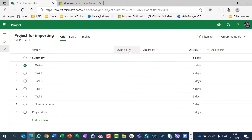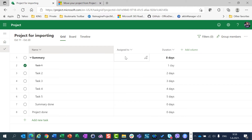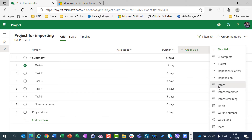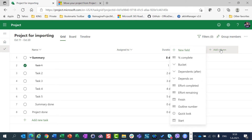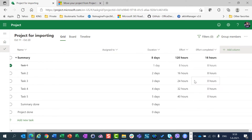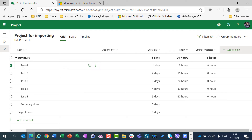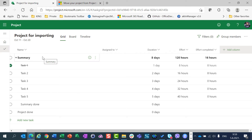Let's go here. You can see that I have no assignments, but let's check — do we have effort? Yes, we have. Do we have effort completed? Yes, we have. So we have effort copied, duration copied, effort copied, effort completed copied, and completion. We do not have the project summary task copied, only the summary task.